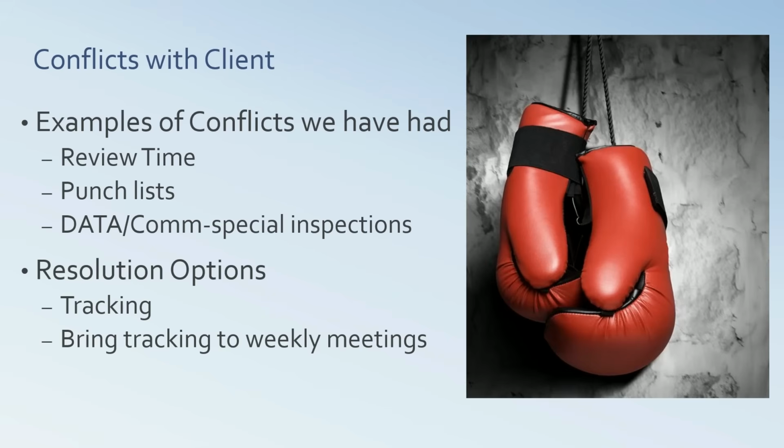So when you get above ceiling, you could do above ceiling punches. There's in-wall punches. There's multiple punches, but you don't want to be running 7 punch lists. You just want to keep adding and/or showing completion on one punch list. That's really the easiest way to manage that. Well, we could talk hours on punch lists alone. That's another key conflict that you'll have to manage.